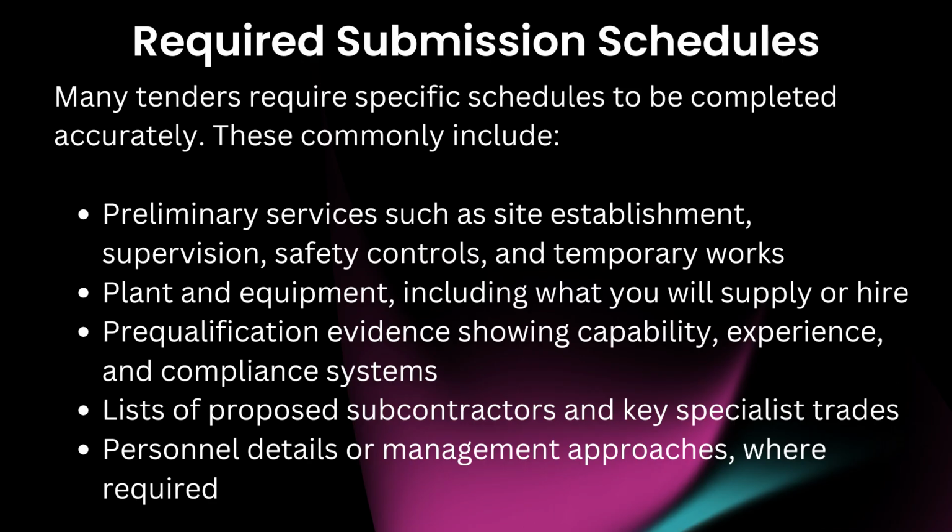Required submission schedules. Many tenders require specific schedules to be completed accurately. These commonly include preliminary services such as site establishment, supervision, safety controls, and temporary works. Plant and equipment, including what you will supply or hire.